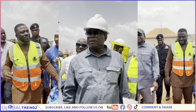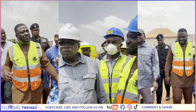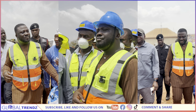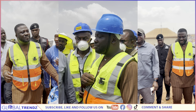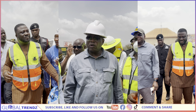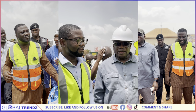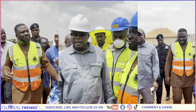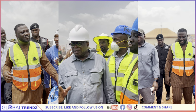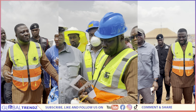Afri-Exim money doesn't exist. That money doesn't exist. That's exactly so. And I think we are in Kumasi, we need to be frank with our people. This project was supposed to be fully funded as approved in Parliament. Unfortunately, the debt situation has made it impossible for the financiers to honor their part. So many of them have pulled out. I think that is what led to the Afri-Exim. Originally, the Afri-Exim 750 was for something else. So cash flow problems, because its IPCs are also not being paid.